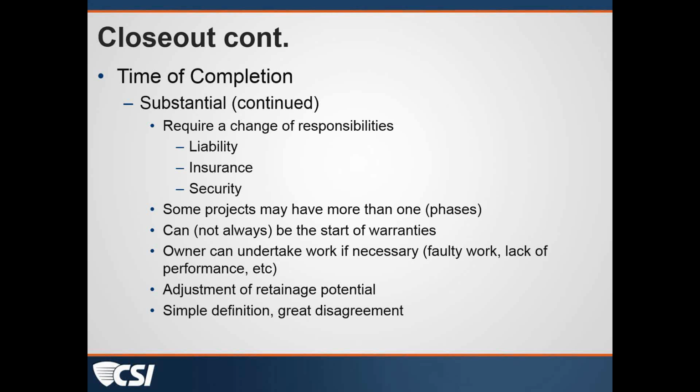I, for example, had floor finishes be an issue, and the owner couldn't take the property because they couldn't move in and set the furniture about, but the local authority was fine with the bare concrete. And so it often is a point of great disagreement what is substantially complete.